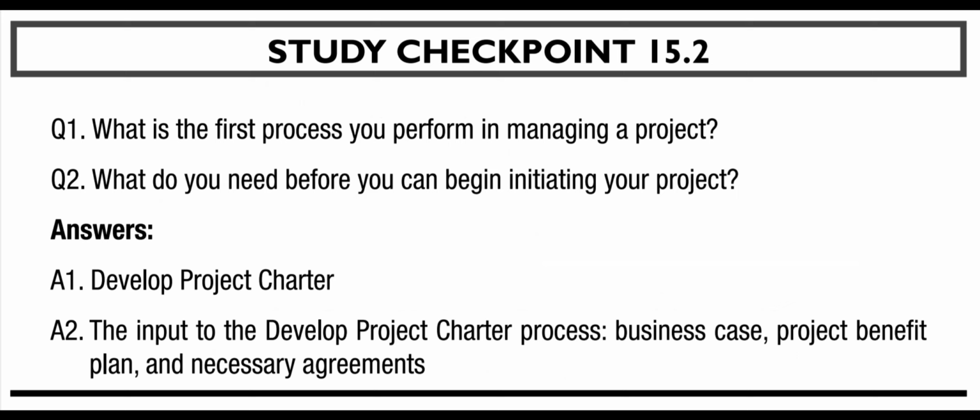Study checkpoint 15.2. Q1. What is the first process you perform in managing a project? Q2. What do you need before you can begin initiating your project? Answers. A1. Develop project charter. A2. The input to the develop project charter process: business case, project benefit plan, and necessary agreements.